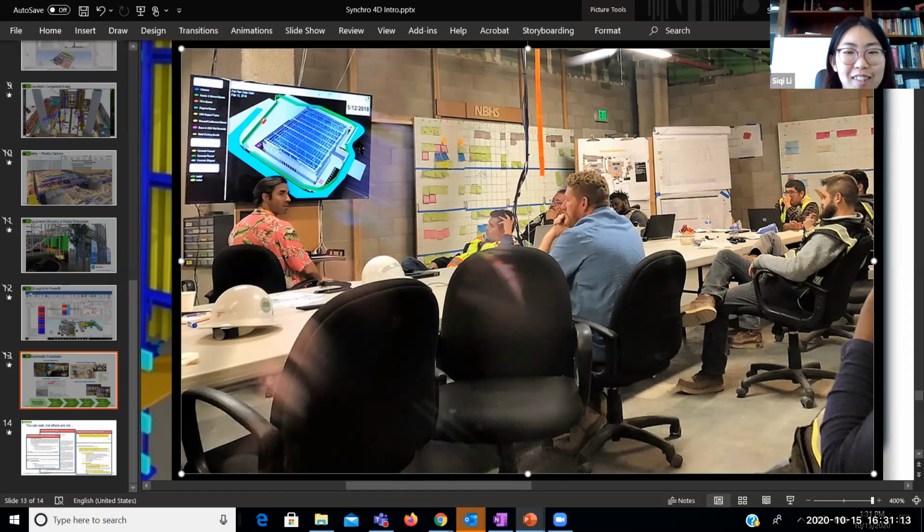If that makes sense. Yeah, so why is it so important to visualize that? Because for a look ahead meeting, it is not only the schedulers who join this meeting. Everyone can join: the field engineers, the BIM guys, the VDC guys, and the project managers. Not everyone is a scheduler or has scheduling experience. In this case, it's hard to make sure everyone understands the task. A model helps people understand the schedule, even though they have limited scheduling knowledge.